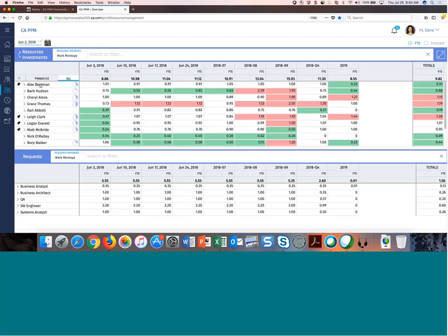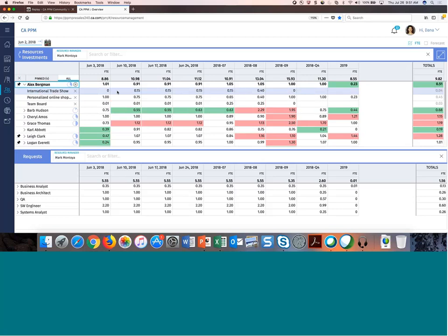I've got Alex dedicated to a particular project through this time frame he's booked. I may convert that to soft. Well, here's an example. I'll say here, he's soft booked right here. I can convert that to hard book either way. He'll be on the project for that span. Now I may want to say, I actually need Alex for 2 more months, so I should be able to come in here and soft book if I want to. So that's the notion of mixed booking. And so we're looking at that and how do we support that going forward. But it's not going to happen in the next release, I can tell you that.